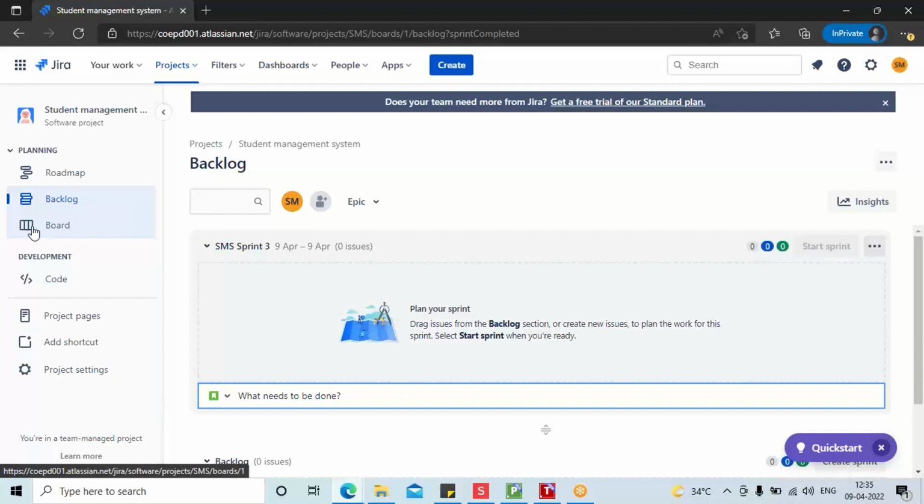One more query here. If the user story has a dependency on some other application or some other API, for which development is also needed, how do we handle that scenario? You attach it. You put a dependency there. I told you, no? You can attach any dependencies. You can tell in the comments that we have a dependency and we can't start this user story without that. You will mention everything in the comments and attach all those dependencies here. Okay, thank you.